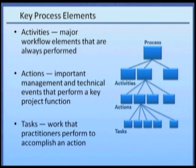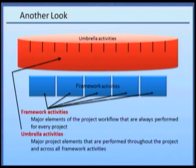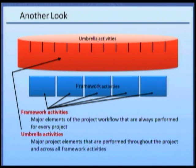The activities come in two different flavors. First, we have a set of framework activities, which identify the process as a whole. These framework activities may be implemented sequentially or iteratively, but they are major elements of project workflow that are always performed for every project. We also have something called umbrella activities, which are major project elements that are performed throughout the project workflow and act as an umbrella covering the entire project.